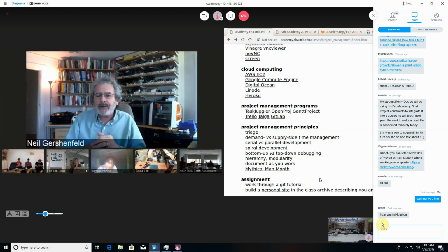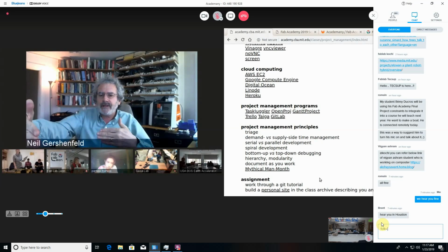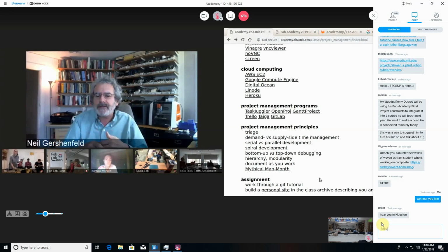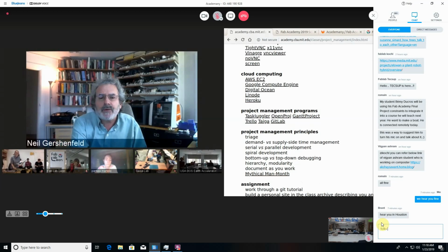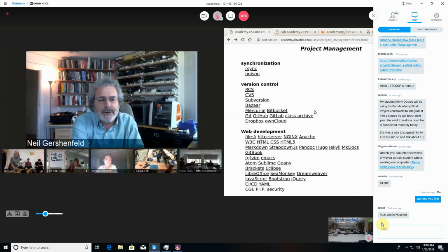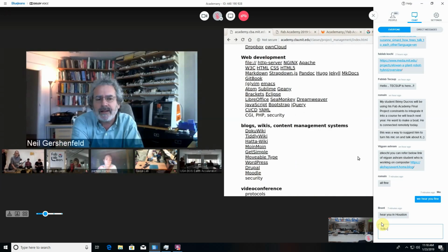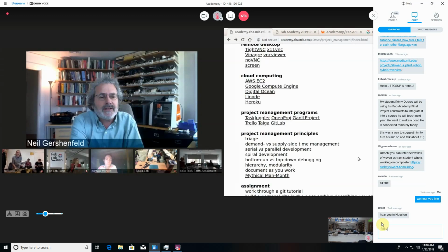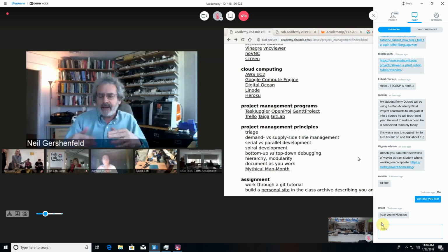A second important principle is serial development is where you do each task in turn, and a single task can fail and you get stuck on it. Parallel development is where you work on the tasks in parallel so one task doesn't block you. And so to do this week's assignment, you need to learn about version control. You need to learn about web development. You need to build each of these skills. And rather than doing them in order, you can run those as parallel streams, working a bit of time on each one, so no single task blocks your progress.